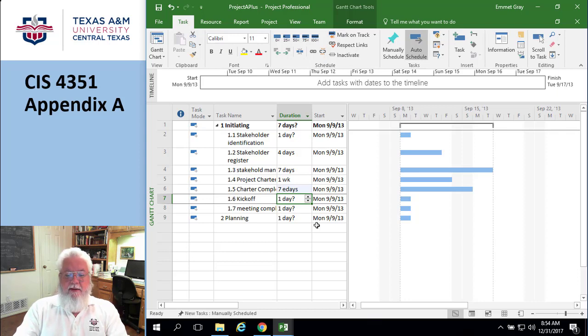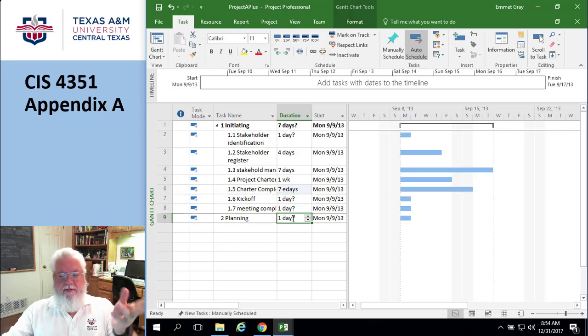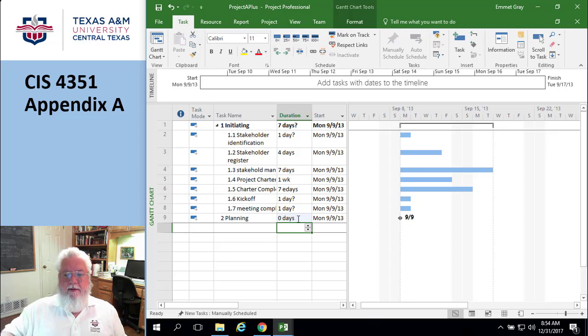Okay, a milestone. So I can go in and pick one particular thing and make a milestone. I'm going to pick one. I'm going to just put a 0 in here. Okay, so 0 automatically made that guy a milestone. He looks different now. He's a diamond and he has a particular date.